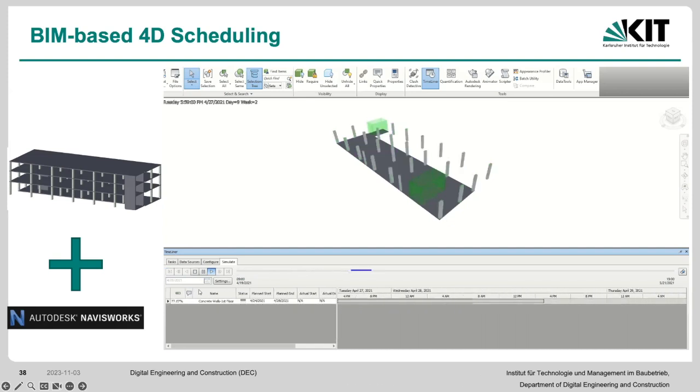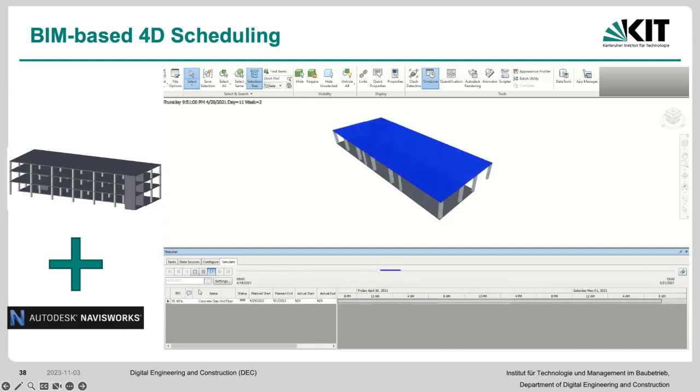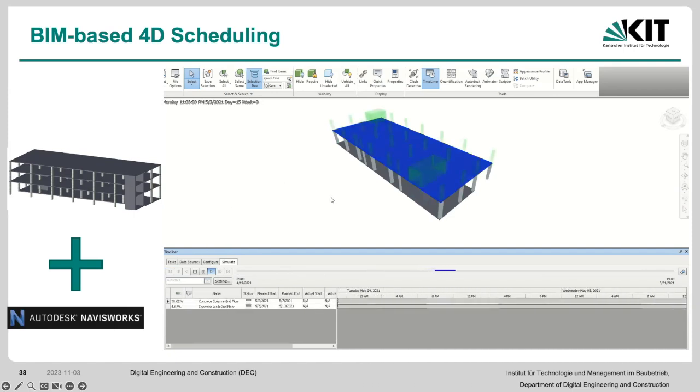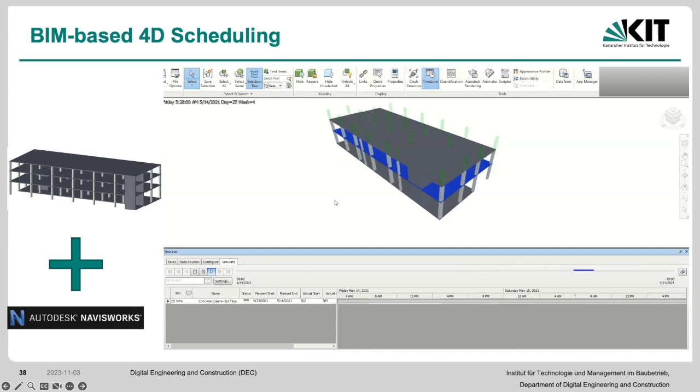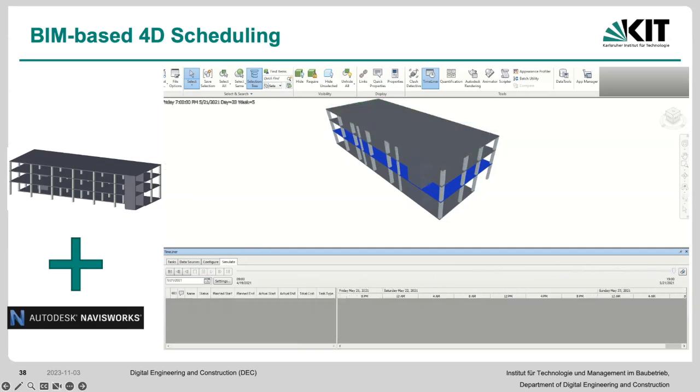So for instance, in this case, you have the beginning, you have the end, you would be able to see how the simulation is, and then take it from there. What this, at least in this current format that I looked into and put together, does not provide is that if the schedule in one of these changes, everything else in the future also changes as well. That is something that requires some level of automation, some level of understanding of what each and every one of these connections and linkages are going to be. And these are ideas that we're going to be utilizing in order to maximize the amount of automation that we're going to be having for each and every one of these.